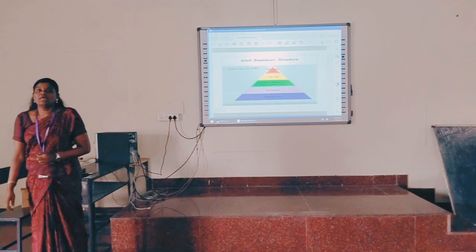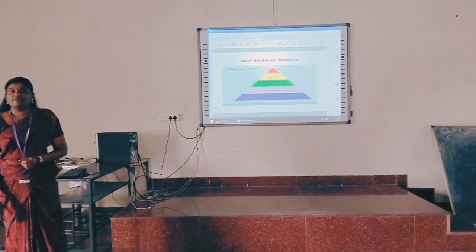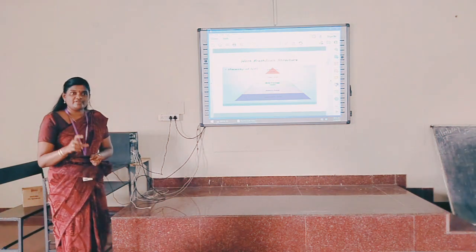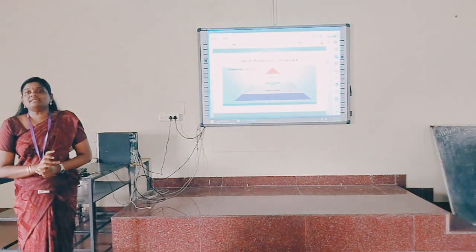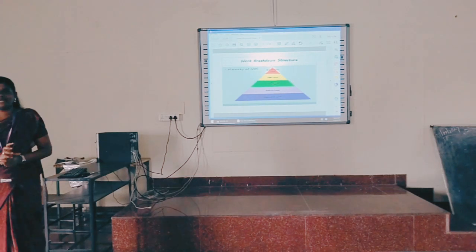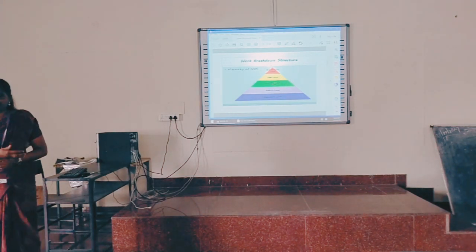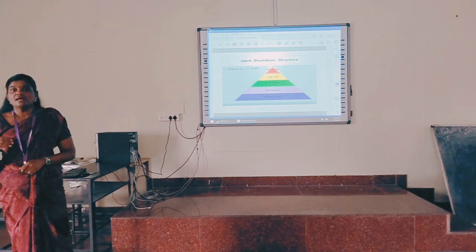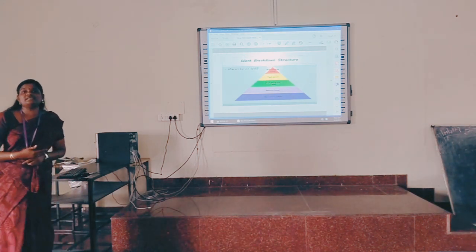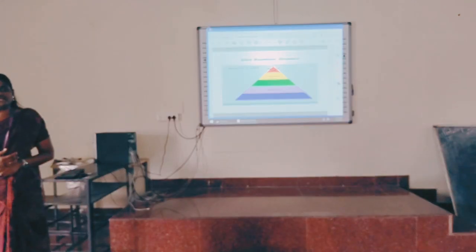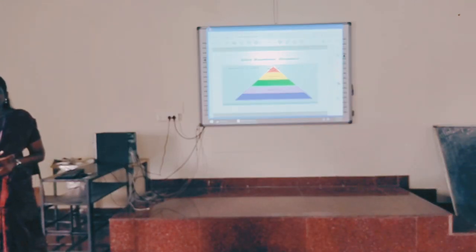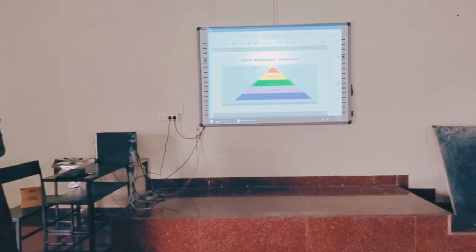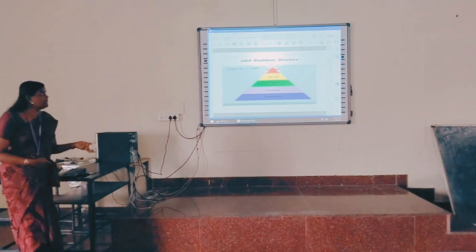The project will be divided into models. First, we think about how many models should be in your project. Each and every model will have activities listed — what activities we are going to perform for each model. There are three approaches for choosing activities: the first is activity-based approach, the second is product-based, and the third is hybrid.